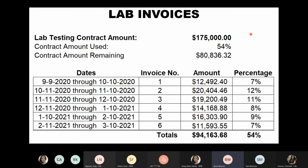Our biggest problem has been getting our signed dailies done in the field, and that's as much my technicians as it is anything. And given we're only 4 blocks from the job, I just drove some over and got those signed this last month, so we should be good. Okay, so what I heard was you're having trouble getting the daily reports that belong to the lab signed on a daily basis? Yeah, it's a function of my guys leaving after the city inspector leaves, but we figured out a method to do that. We just have whoever's going to the site the next day, and it's usually the same guy, take his previous day's report and have the city inspector sign it the next day. So we've got that worked out.